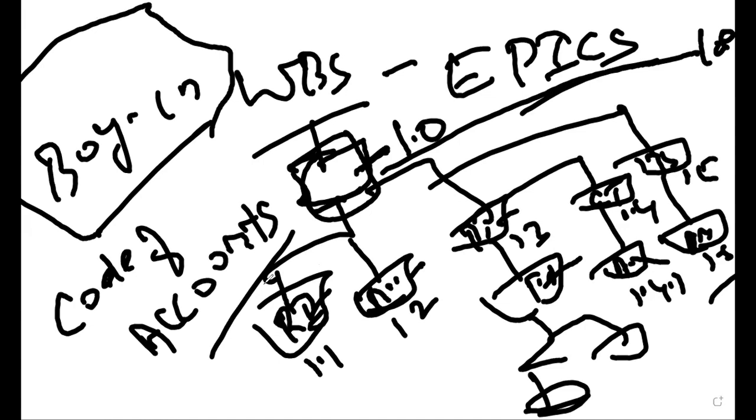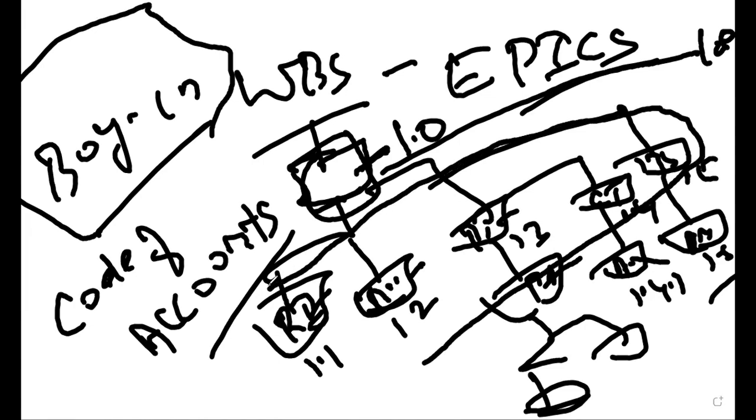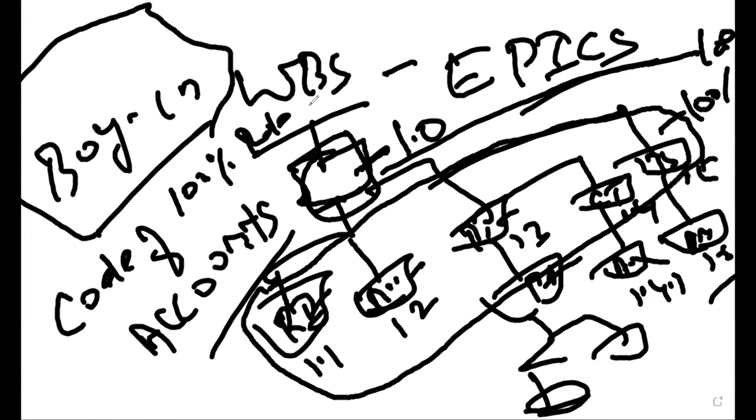So once you count the next level, which is one more level lower than the first level, once you add all of these, they will contribute 100%, right? Each and every level of your WBS has to contribute 100% of the work, right or wrong, sir? Please note down, this is called the 100% rule. The 100% rule should be followed for each and every WBS component.